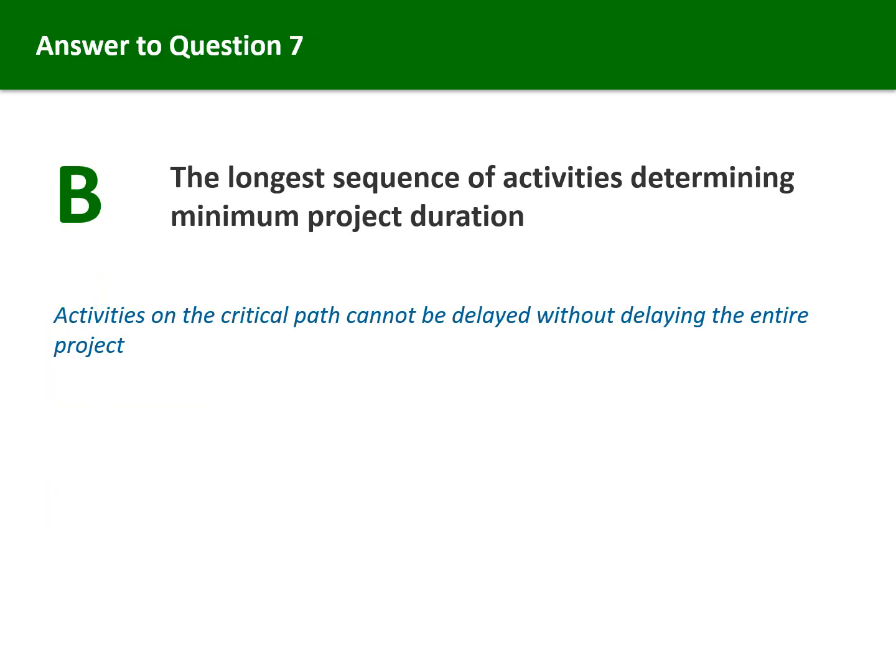The critical path is the longest sequence of activities in a project plan which must be completed on time for the project to finish by its due date. An activity on the critical path cannot be started until its predecessor activity is complete. If it is delayed for a day, the entire project will be delayed by a day unless subsequent activities are compressed. Understanding the critical path is essential for schedule management and identifying where project risk is concentrated.